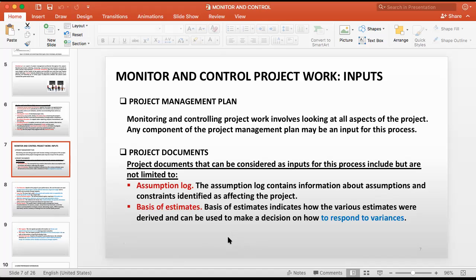Otherwise, you have a rate developed, say, by the government or whatever organization. You take that one. To do 1 cubic meter, this is the price. So if you are doing 10 cubic meters, you multiply by this rate, you get the answer. Likewise, there are some estimation techniques. So you will see in an excavation how I am going to estimate. Similarly, for some social work or product development, there will be estimating techniques. For each industry there's a specific estimating technique. So in the apparel industry, there's a way of doing that estimation. So you have to take that as